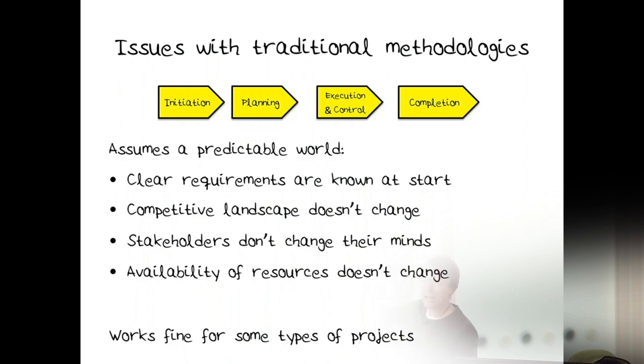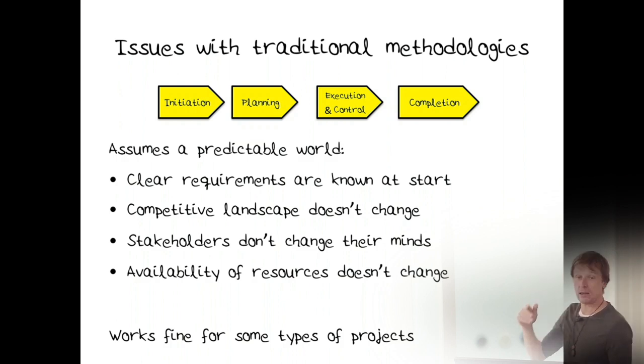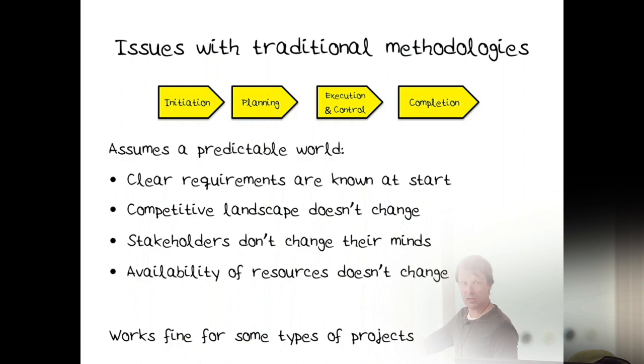Now, this way of doing things assumes a predictable world. It assumes that the requirements are known from the beginning. It assumes that the rest of the industry in which we operate grinds to a halt while we develop our new product or our new feature. It assumes that the stakeholders don't change their minds. They change their minds all the time. The higher up you are, the windier it is, the more they change their minds. And it also assumes that the resources that we assign to this are available for the project.